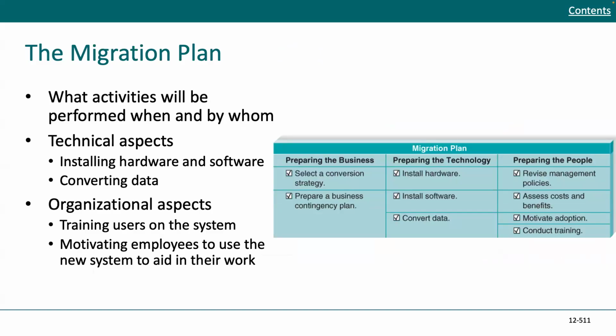So it's beneficial to have the migration plan: when activities will be performed, when and by whom. From the technical aspects, there's installing the hardware and software and converting the data. From the organizational aspects, there's training the users on the system and motivating employees to use the new system to aid in their work.